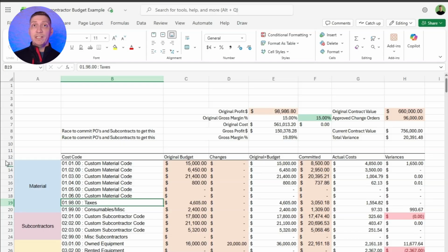We would have had to just absorb those losses. It wasn't something that we could claim as, well, we didn't know this when we started the project. It was all right there in the geotechnical and the specs and everything. It just wasn't working. It was a wet year. We couldn't control it. It was out of everybody's control.